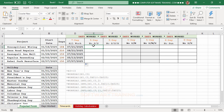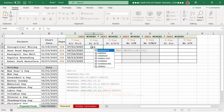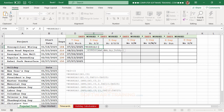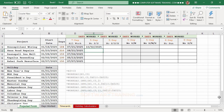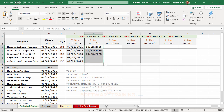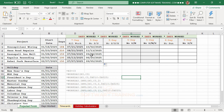For the next projection, we don't work Saturdays or Sundays — just Monday through Friday, five days a week. We use the WORKDAY function, which figures out the projected date based on skipping weekends. We type the equal sign, type 'wo' and double-click WORKDAY, select the start date, add a comma, then click the number of days cell, and press Enter. Copying the formula down shows how much further out the dates project when excluding weekends.